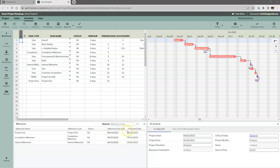If we generate schedule again, we'll see the projection of that internal milestone. After running generate schedule, the internal milestone is projected to be October 16th — four days before the end of the project date, which makes sense. These dates will be accepted into the plan at some point: the completion milestone will be locked in time, while the internal milestone will float left and right as a target we can monitor.